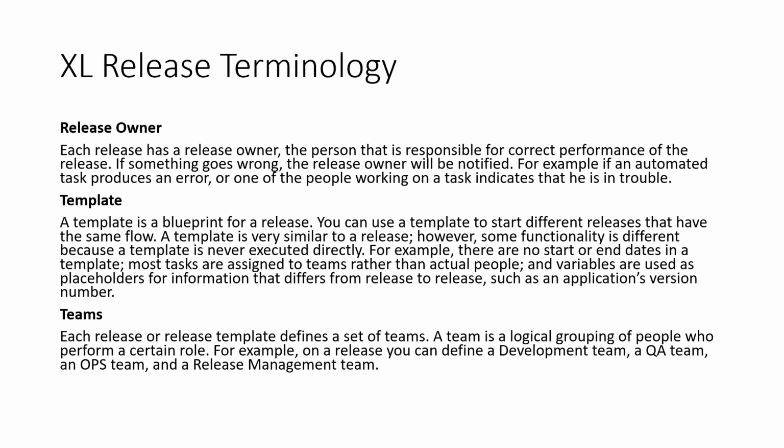However, some functionality is different because a template is never executed directly, while a release is executed directly. For example, there are no start or end dates in a template, but a release has a start and end. Most tasks are assigned to a team rather than actual people, and variables are used as placeholders for information that differs from release to release, such as an application version number and stuff like that.